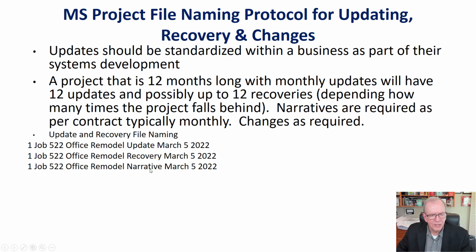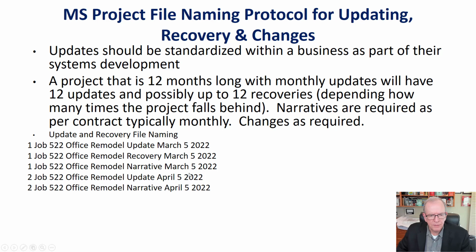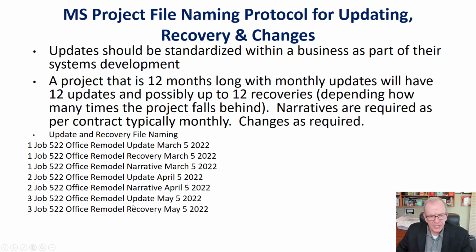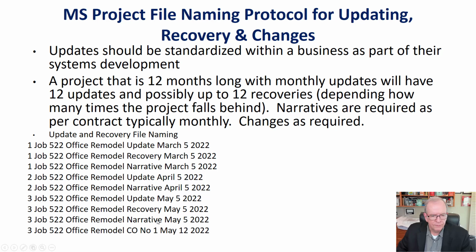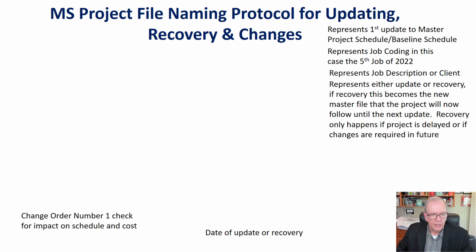That's like a Word document usually that gives the highlights. I'll go over that in another video. Then we've got our remodel update. So this is a different project, obviously, different dates, but I'm just sort of showing you the process. And again, this has an update, a recovery, a narrative. An update, no recovery, it must have been on time, narrative. Update, recovery, narrative. Change order, right? So then this one has a change order in it.